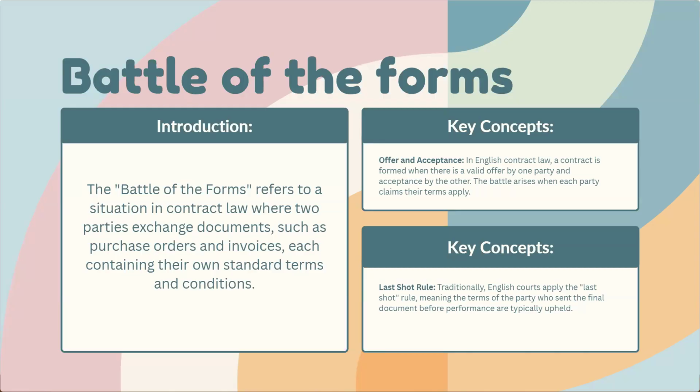First of all, when the supplier sends an order acknowledgement, you need to review whether it has further terms and conditions. If it has none, then it's okay. It is accepted. But if the order acknowledgement has the supplier's own terms and conditions, you need to give them another communication, another letter about your terms and conditions and the specified product as well as the deadline, like a purchase order confirmation. That way, you can create a counteroffer and make them accept that counteroffer.